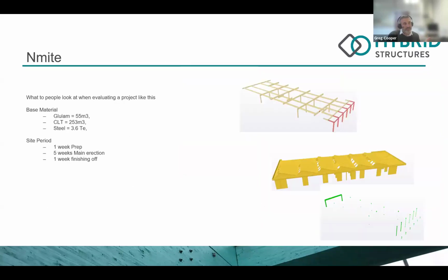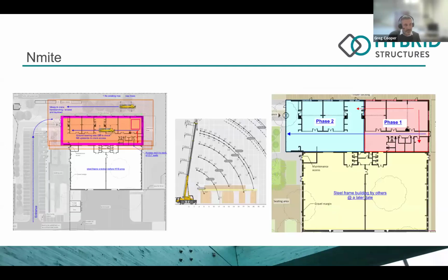So as he says, there's the base material. In total, we were approximately 7 weeks on site, 1 week's prep, 5 weeks main erection, and then 1 week to finish off to make sure the connections were fire rated, fire safe, etc., to get those to work.